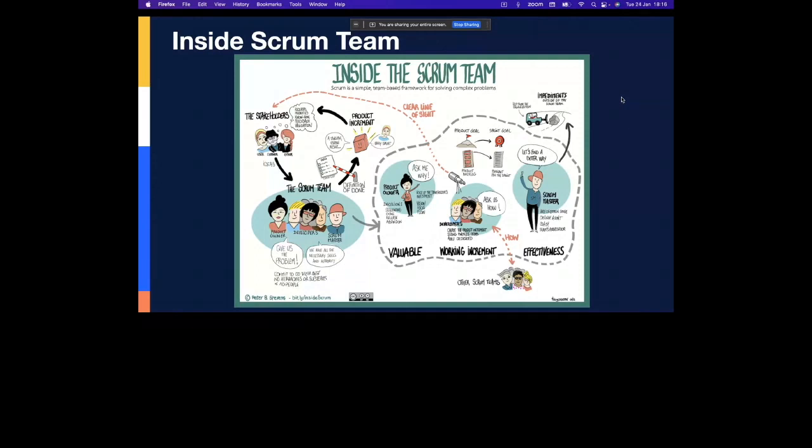It could be the design, the development, the unit testing, the automation, performance testing, accessibility testing if you must do it, and then reliability testing, stability testing. All those kinds of requirements can be defined under the DoD, so that you basically have a checklist prior to acceptance. The DoD has to be met.